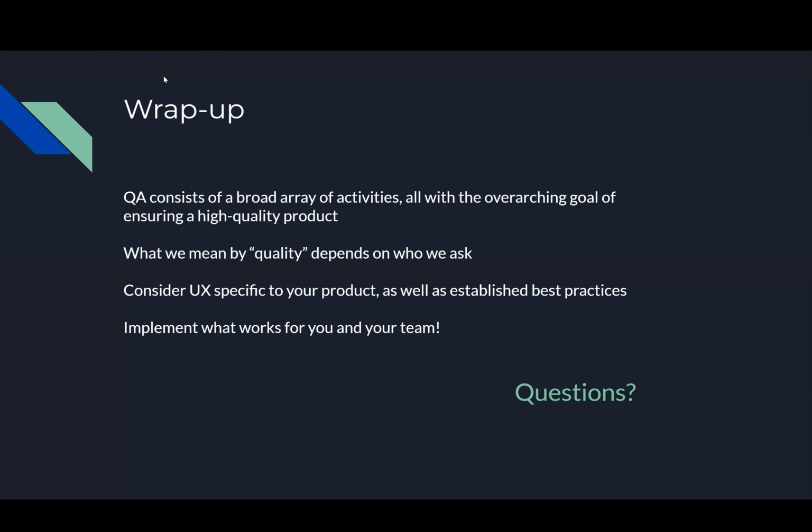Okay, thank you. One thing that can help is we have, at least on Vamos, the acceptance criteria as part of the Jira ticket, and that could provide a through line all the way from the creation of the ticket to testing by the developer, to manual QA, to eventually being incorporated into the ongoing QA script. So if we really flesh that out and have a good set of acceptance criteria, ideally we could just push that all the way through and use it at each step along the way. Yeah.